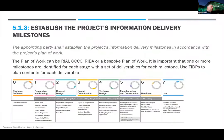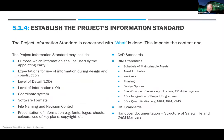That's the information requirements. Next, we've got to establish the project information delivery milestones — essentially a plan of work. What are the stages you're working to? An example is RIBA, but it could be RIAI, Government GCC contracts, or your own bespoke system. At the airport, we have a bespoke system, slightly similar to RIBA but with differences. What we need to align with those stages are the deliverables at each point. You need to ask: how do we know who's going to check these when they come in? How do we know they meet requirements? Some deliverables might be received at one stage and updated at another.